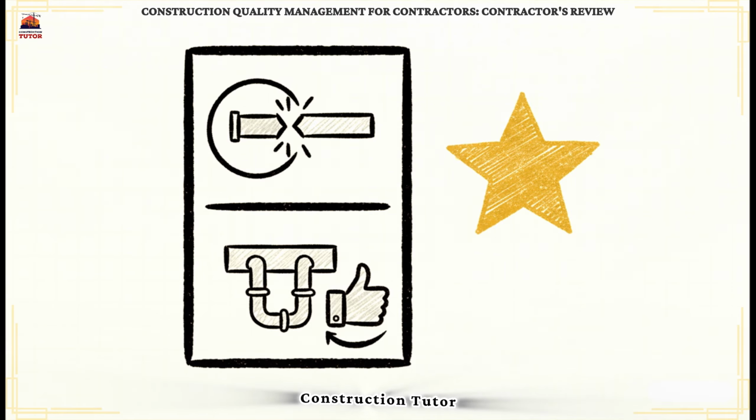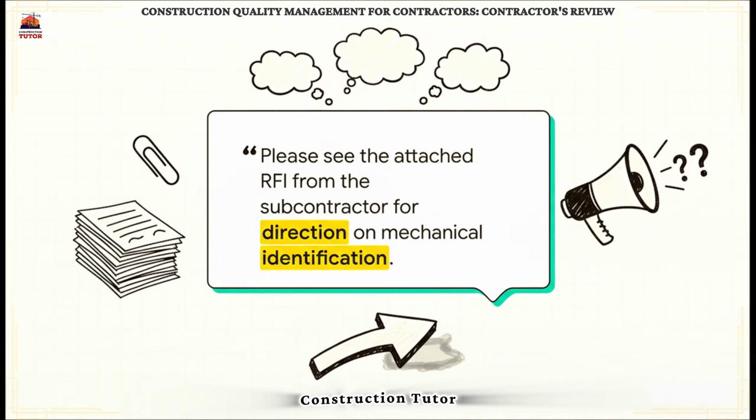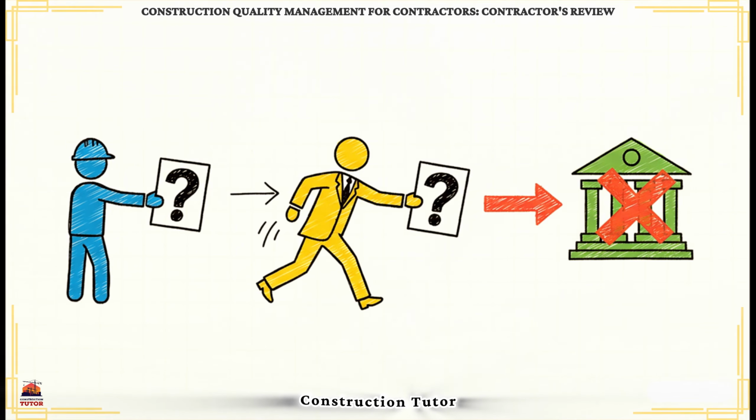Just beautiful. Okay, now for the other side of the coin. In this second RFI, the prime contractor literally just attached an email from their sub and forwarded it on. There's no context, no review, no coordination, nothing. And this is a classic Category C mistake.